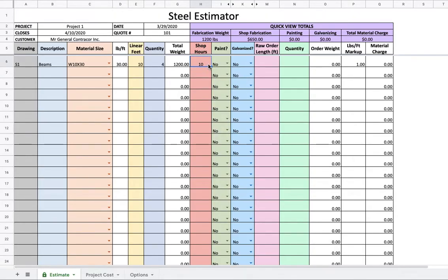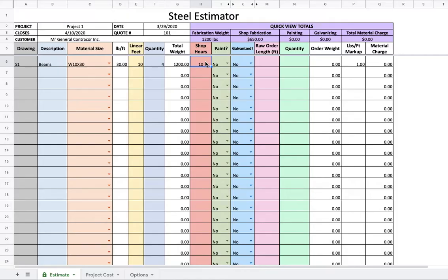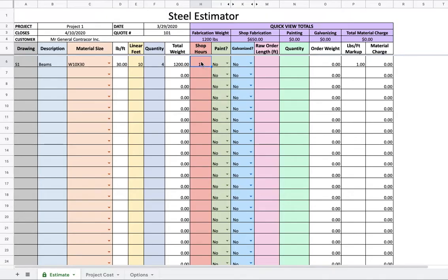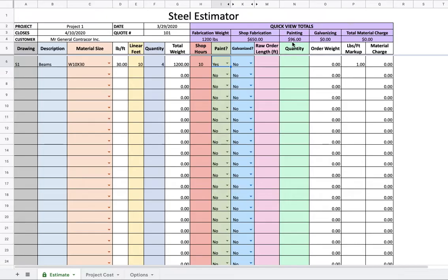Shop hours. Let's say these are going to take 10 hours in the shop. So right there, that is a small fabricator kind of thing. Big fabricators tend to use weights, but small fabricators you can't, because some big beams are going to just fly through your shop, and some little handrails are just going to sit in your shop for weeks. So use your experience and judgment on that part.